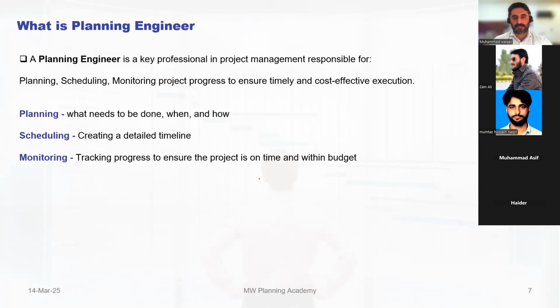And in order to detail it, we can do it in anything. We can do it on simple paper, in Excel, in MS Project, and we can also do it in Primavera. Why do we choose Primavera? Because these construction projects last from 1 year to 3 years or up to 4 and 5 years. So these are very big projects, and only Primavera has the feature that it can contain these big projects. It can contain up to 100,000 activities. So you can detail all of them one by one and you can cover all of those.